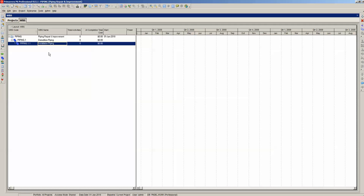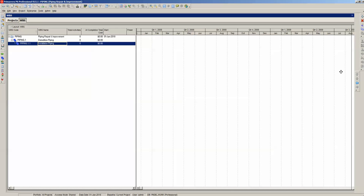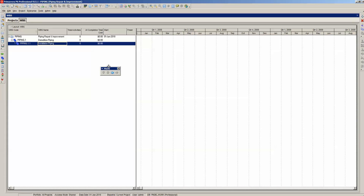However, we want Installation Piping to be a sibling of Demolition Piping. To make Demolition Piping and Installation Piping siblings, we need to use the Move tool group. Click the Move tool group at the far right of the screen and drag it over to our workspace. Highlight Installation Piping and click the left arrow to make it a sibling of Demolition Piping.